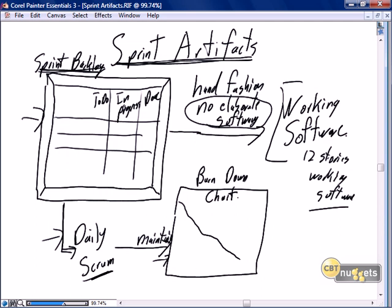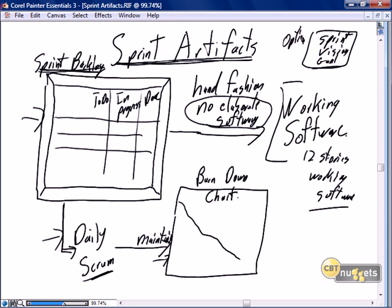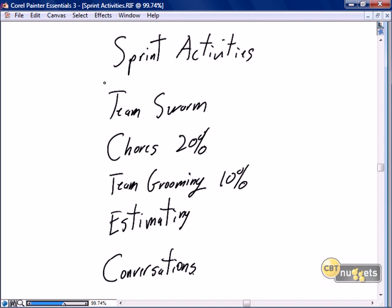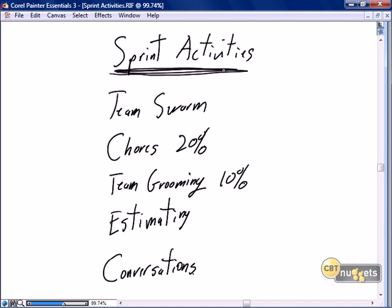One artifact I haven't specifically called out is our sprint vision or goal. I didn't specifically call it out because it is optional, but highly recommended. The focus of running an effective sprint is right here: the sprint backlog developed in planning, our daily scrum to manage our progress against that, our reporting on the burndown chart, and the production of the minimal amount of work to satisfy the minimal requirements on each story — with the focus on working software.